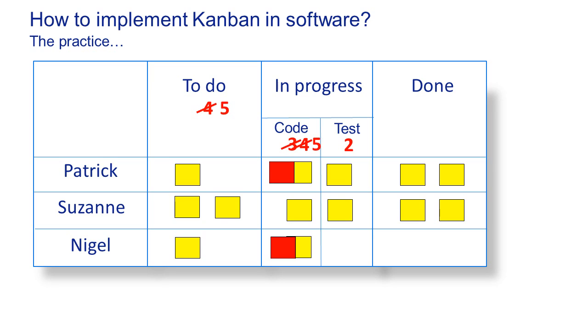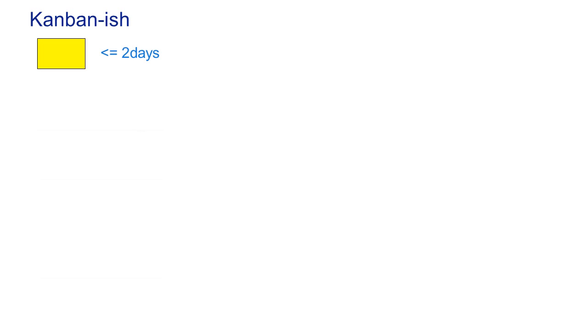It's very hard to say to a customer or project leader 'I'm sorry, we can't start working on your task because it violates our work in progress limit' — that doesn't mean anything to people outside the team. So we introduced something I've called Kanban-ish, based on a presentation I heard at a Kanban conference a few years ago. Basically, for each item we say it's got to be less than or equal to two days. If an activity is longer, we split it over multiple post-it notes.